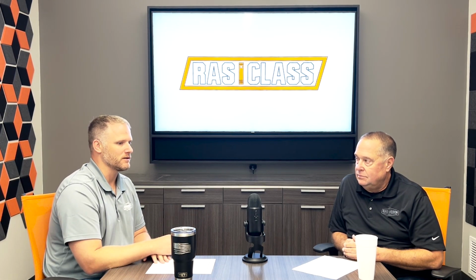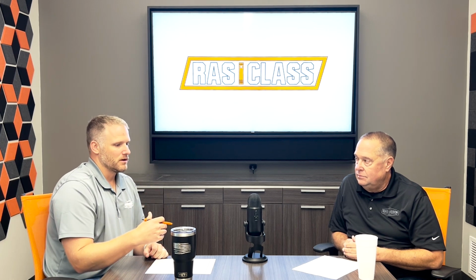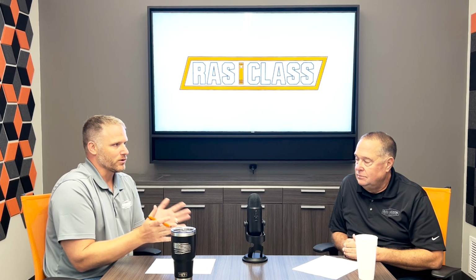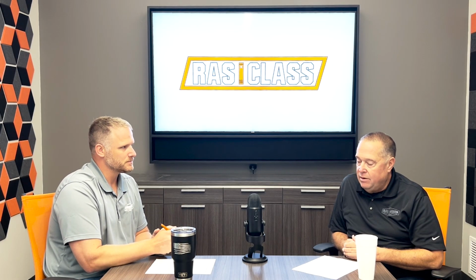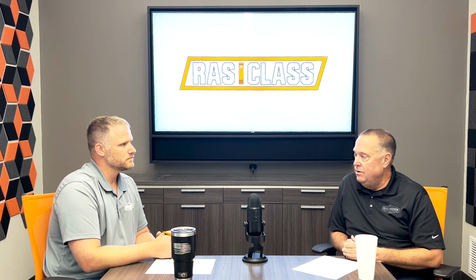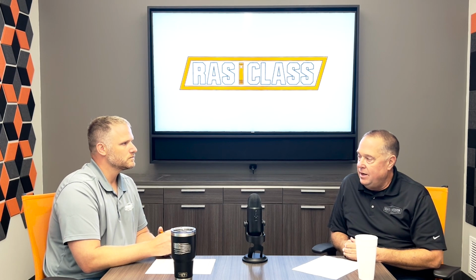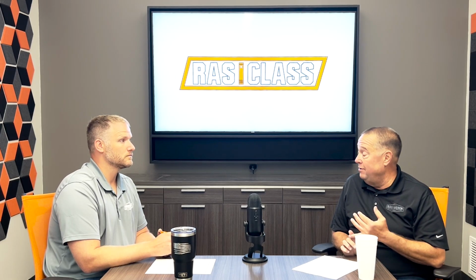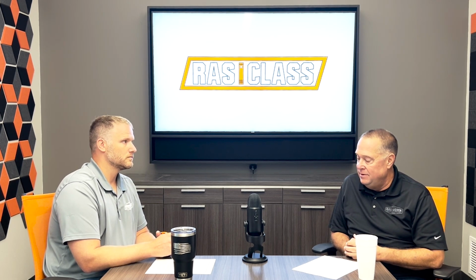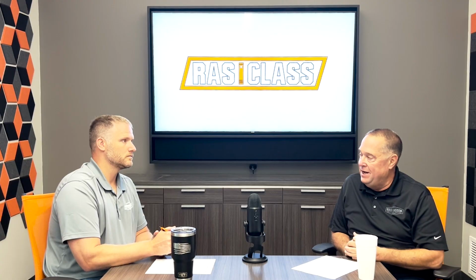Do you have any horror stories of where they hired a local that was much closer, maybe faster, maybe who they work with all the time, and they bit off more than they could chew, or didn't understand how something was set up? Oh yeah, we had one recently within the last 6 months that they had their local guy do it. It was a few hours from here, and he claimed he was familiar with AutoFlame and everything, and he wasn't, and got way off in the weeds on what he thought he was troubleshooting, and ended up rewiring the feed water valve, wired it backwards. It was a mess, and we ended up spending more time fixing what they did than it would have taken us to go do startup.